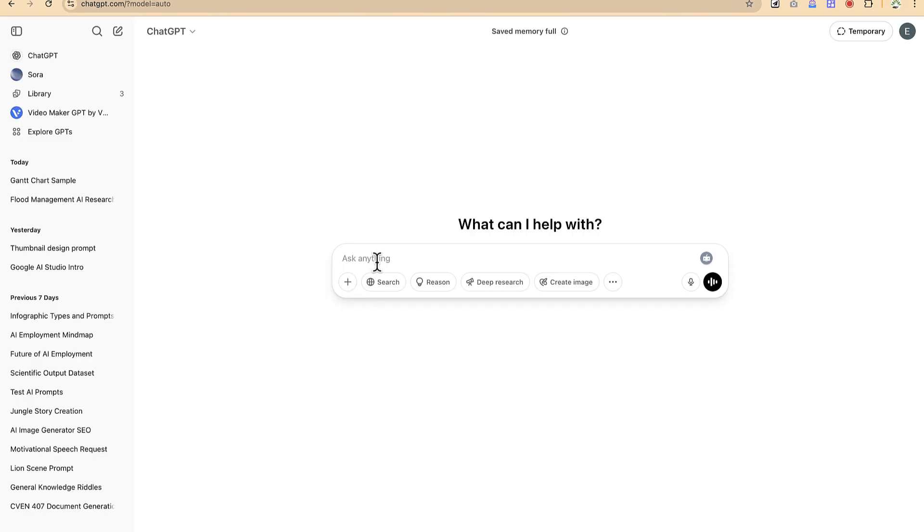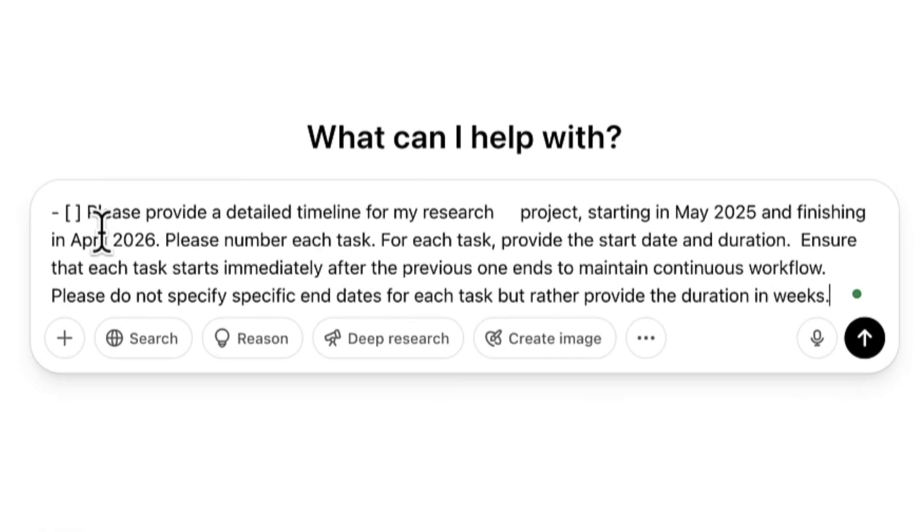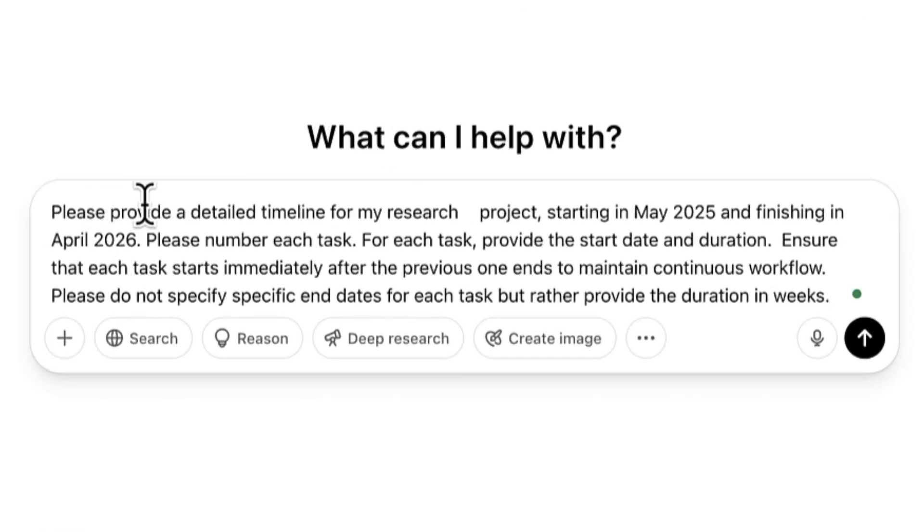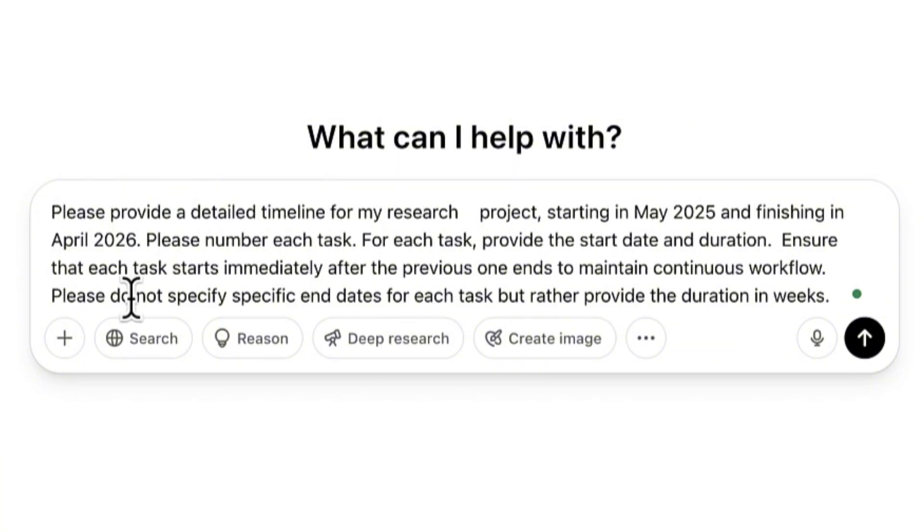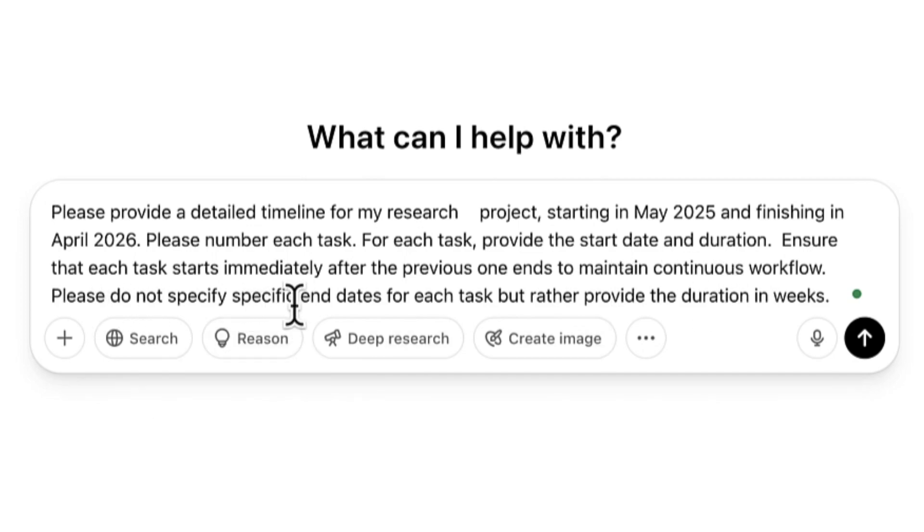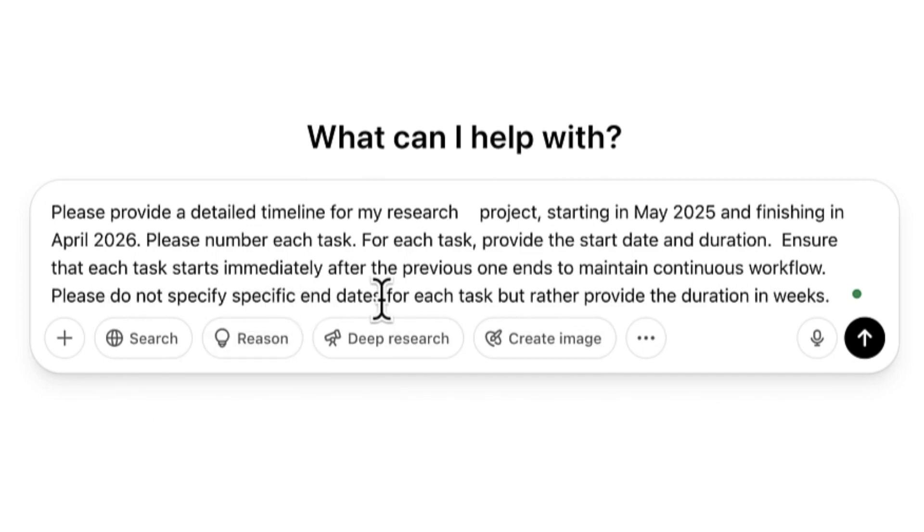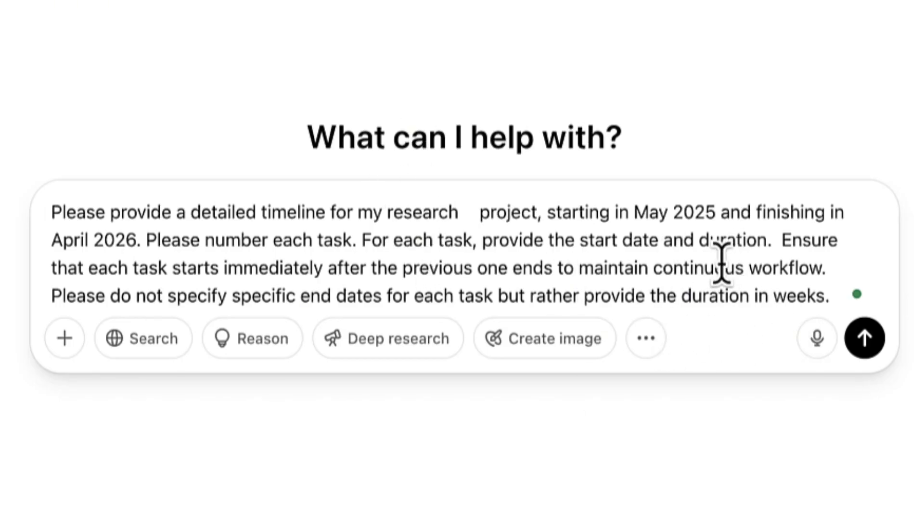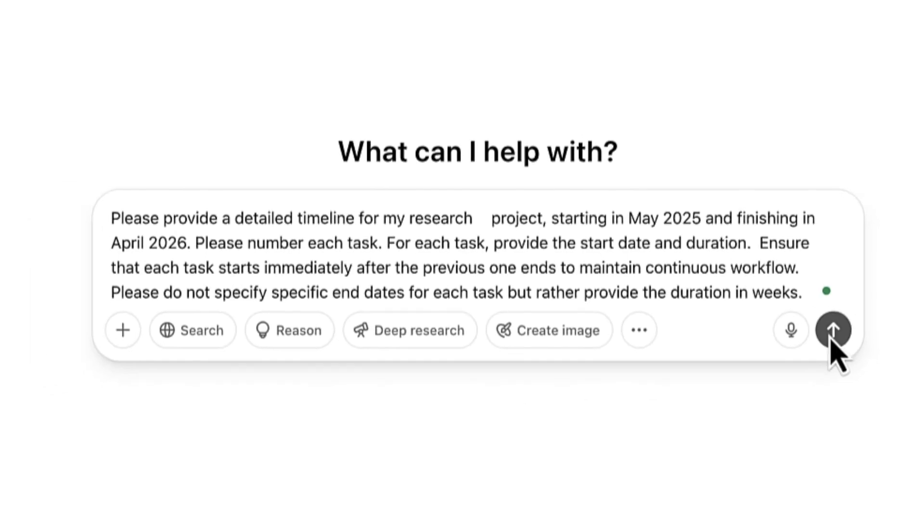Let's start with the first option. I have this prompt: 'Please provide a detailed timeline for my research project starting in May 2025 and finishing in April 2026. Please number each task. For each task provide the start date and duration. Ensure that each task starts immediately after the previous one ends to maintain continuous workflow. Please do not specify specific end dates for each task, but rather provide the duration in weeks.' This is the instruction and prompt we're going to use. I'm going to put this in the description of this video so you can have access to it as well.